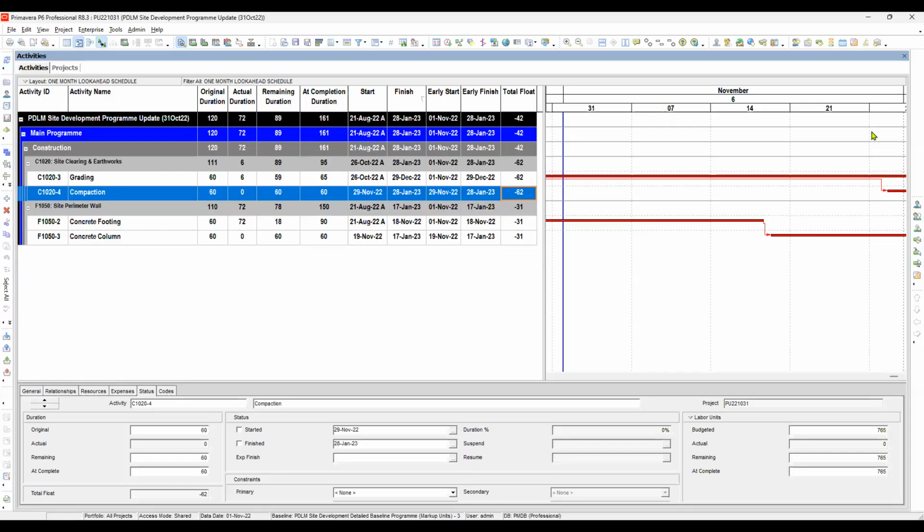So if you look here, from the data date down here, this layout shows only the 1 month period, our 1 month range of available activities to execute, meaning these are the activities available for execution, which are doable. There is nothing constrained in here, so it shows the duration of the activity within the range of a 1 month period of looking ahead.